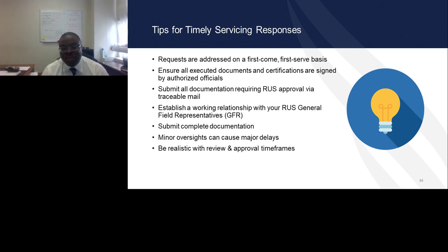However, that does not mean that awardees should delay their planning process. So if you want to go out to bid tomorrow, today is not a good day to send us a template of your non-RUS contract. That needs to be done well ahead of time, giving program staff enough time to review those documents.